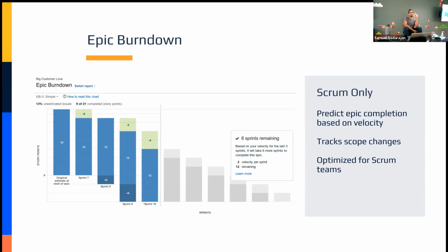That light green section at the top will show you how many story points were completed for that epic within that particular sprint. So green is good. It applies in this epic burn down like it does in real-ish life. Unless you look green, then that's not a good thing, right? Well, remember with epics, they will typically span multiple sprints, right? So green is good because it's chopping away at how much work is left to be done on that epic. Whenever we see green, that means that we are completing work for that epic.